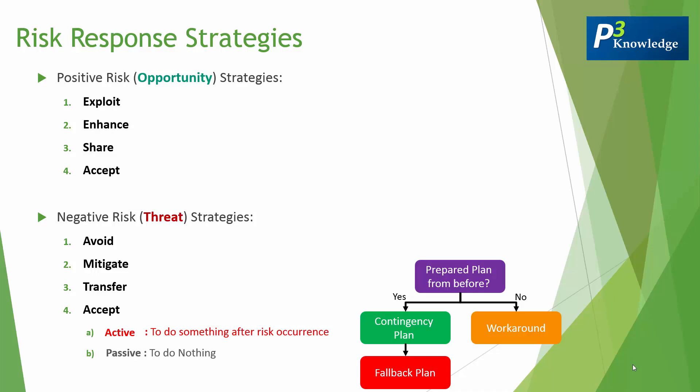What's the difference between avoid, mitigate, and transfer versus active acceptance? Avoid, mitigate, and transfer are strategies you need to execute before the risk happens, while active acceptance is doing something after the risk happens.